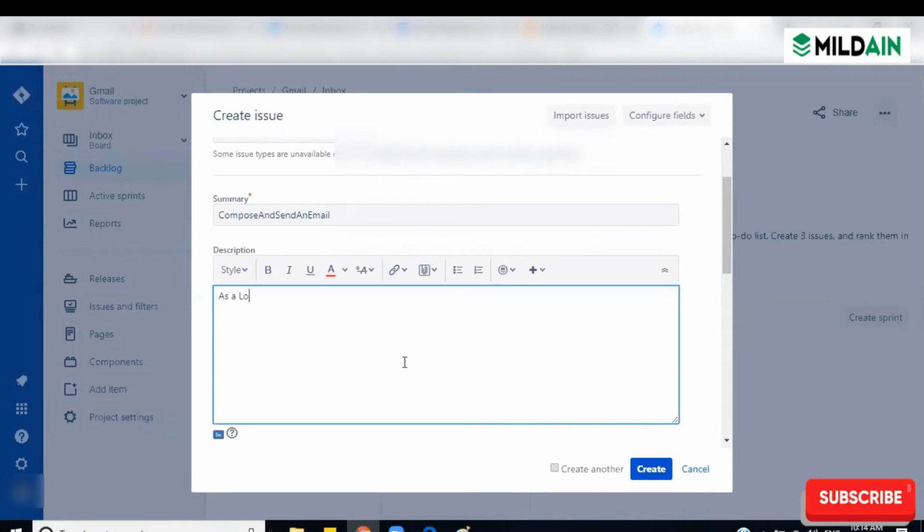This story is getting created under which sprint? The sprint is not yet created. We are just creating backlog items. Once they get groomed and all, then the sprint will come into the picture.